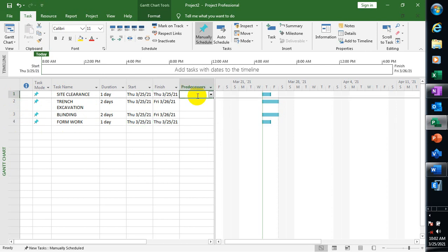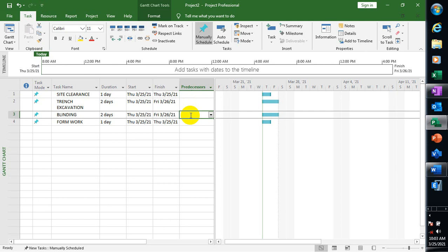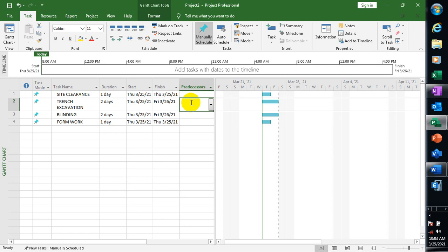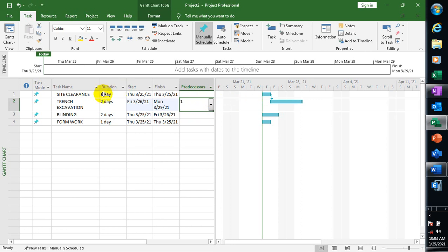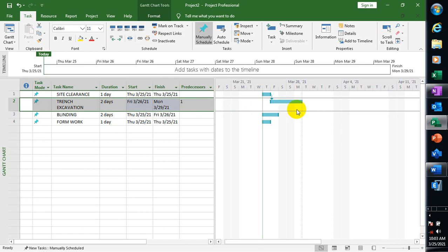Now let's look at predecessors. Site Clearance is actually going to be a predecessor for Trench Excavation. So in the predecessor field for Trench Excavation, I'll type '1'. By typing 1, I'm telling MS Project that immediately after my Site Clearance finishes, I'm going to be starting my Trench Excavation. You can see from the chart that Trench Excavation has actually shifted.